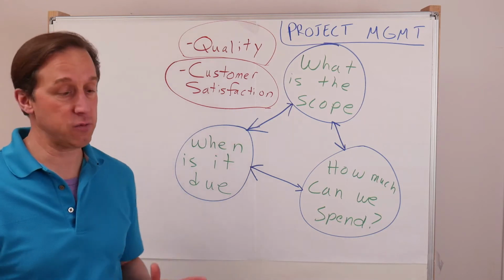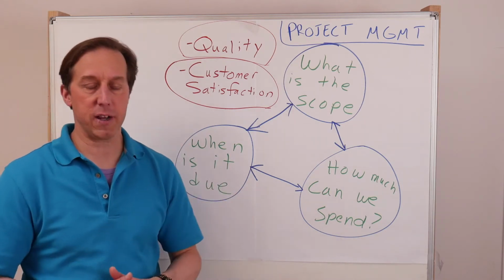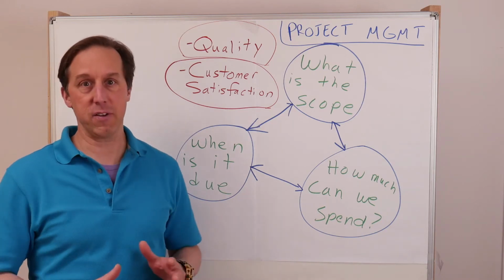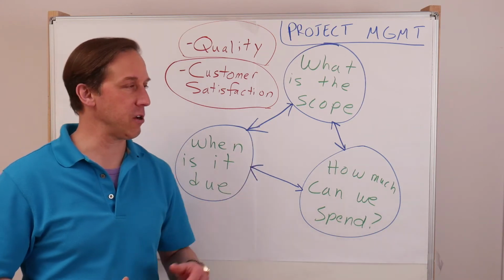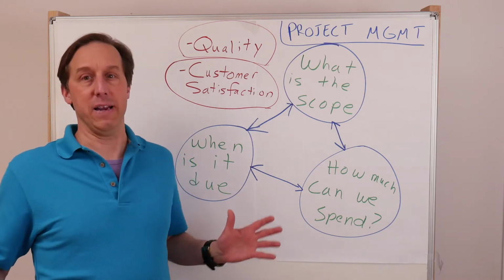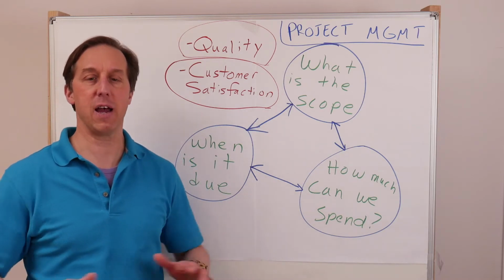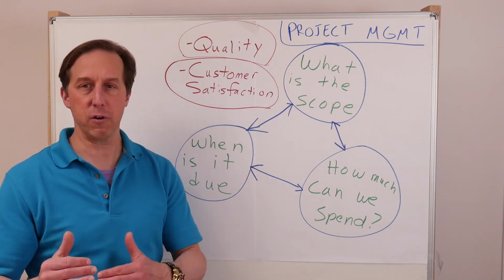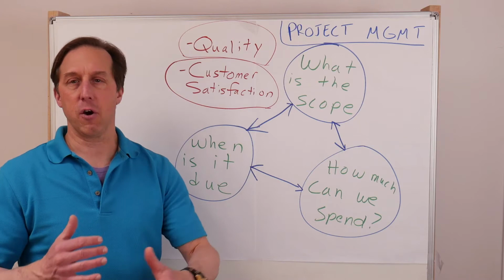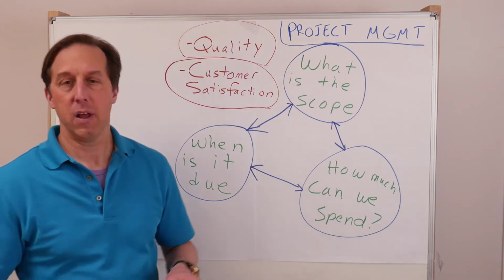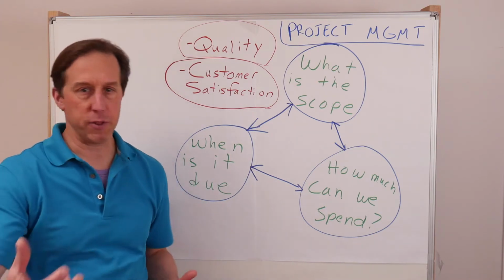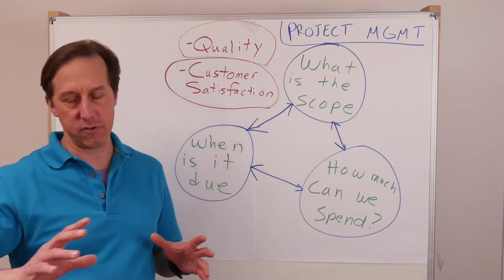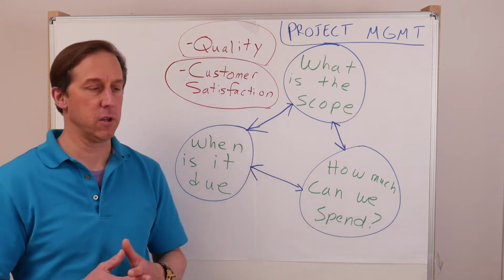And there are other projects where this product is due, say April 10th, and maybe it's done on April 10th and it could go off and get launched on the space shuttle, and maybe it's not. I mean, the flexibility on time was not there. However, cost was pretty close, but maybe the scope was just whatever we could do in that time period. Ideally, we'll negotiate with the customer and say, hey, look, this scope we can complete in this time frame, and it's just going to cost this much with our given infrastructure.